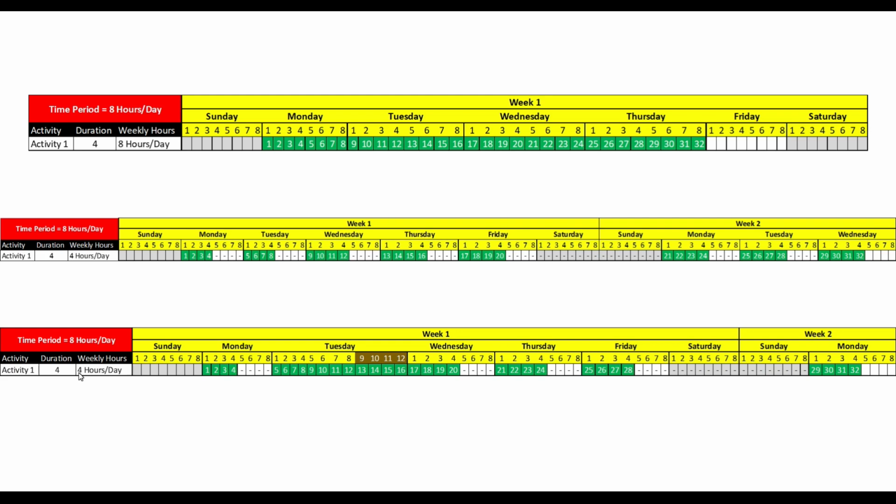We're going to keep that 4 hours per day, but Tuesday of week 1 was actually specifically altered, and the scheduler went in on this particular Tuesday and increased it to a 12-hour working day. So every other day in our calendar is that 4 hours per day clip, but Tuesday was specifically altered to 12 hours, which is actually going to bring our finish date into Monday here.